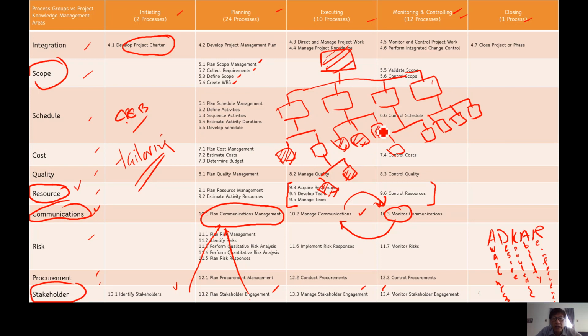All these shaded areas, we give a special name. We call them work packages, okay, under this work breakdown structure. So this is the structure itself, the drawing itself is called work breakdown structure, WBS in short. These are the children basically, right? Which is the end of the line. So in scope, they are known as work packages.